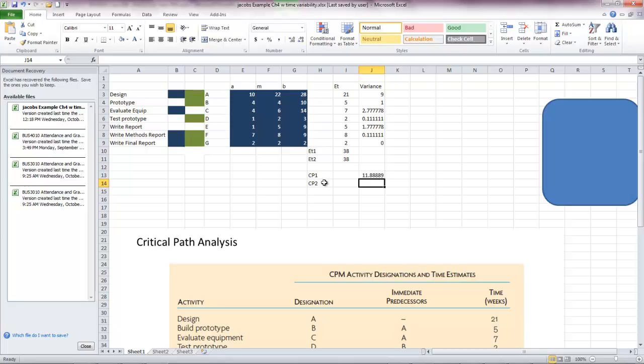So the other critical path variance that we need to do is add, we're adding the green rows up for variance. And it's going to come out different. See? Now there's a difference. Now, the reason we're doing this is just what the book commented on, is that the variance through one of those paths is different than the other.